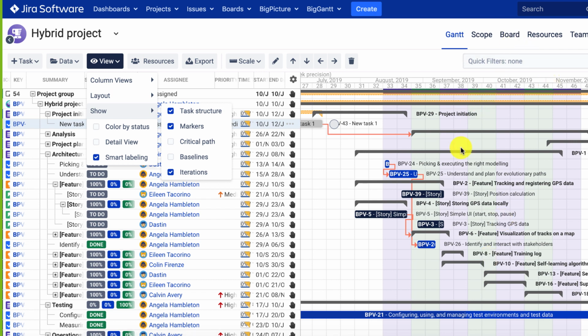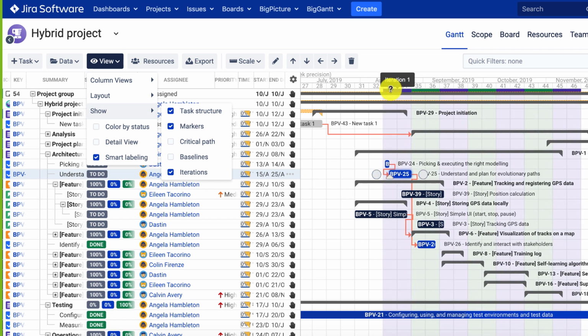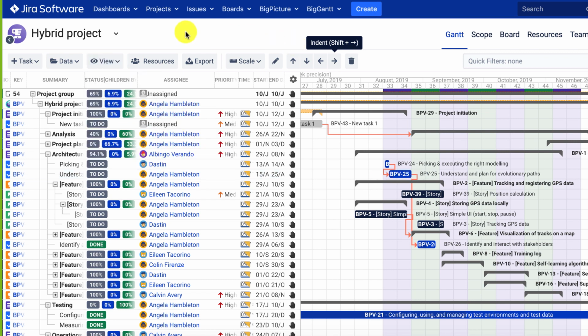You can still use this feature, but you would be required to have a separate program with the old board running if you plan to use the new version of the board. The feature works such that once an issue is planned in a sprint, it will also update the start and end dates of this issue to align with the sprint's start and end date.